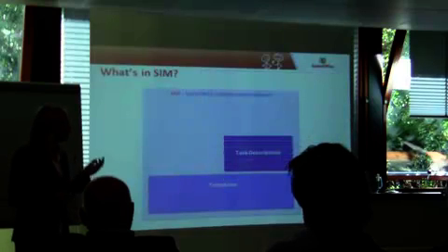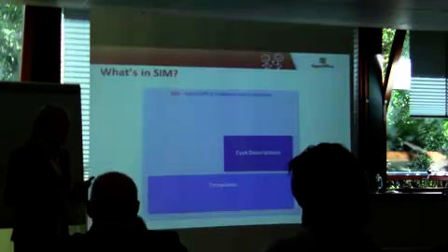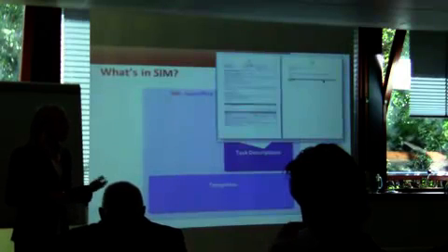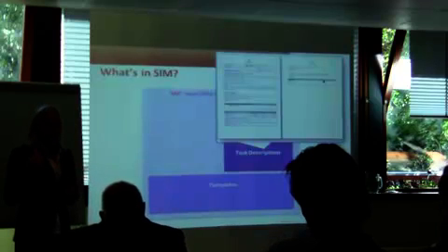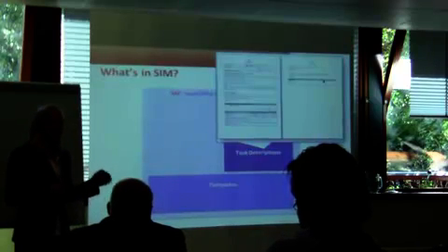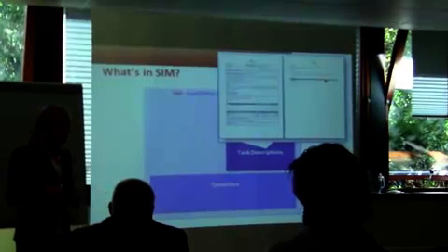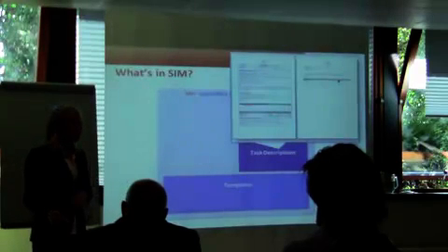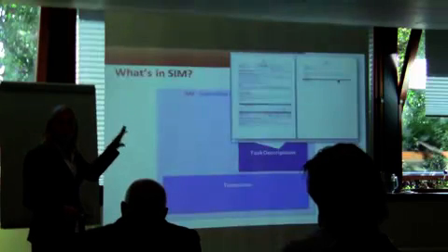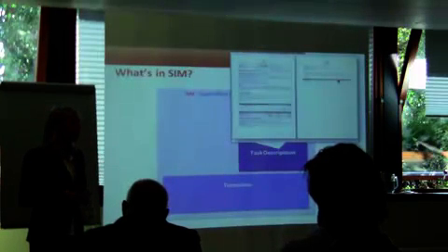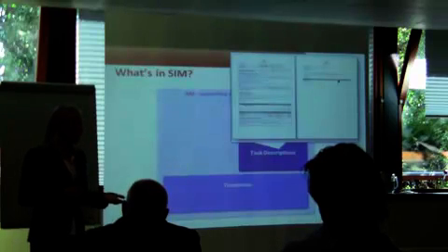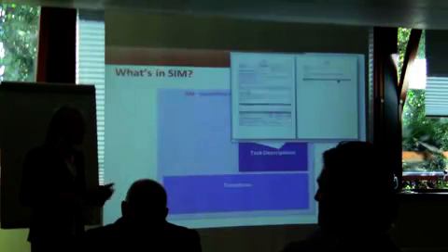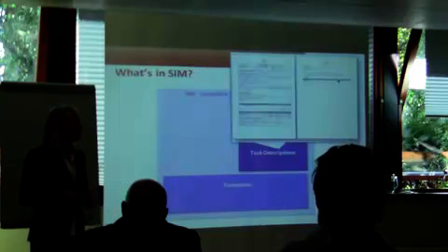But before being able to put the result into a template, we also have some other elements. We have what we call the task description, which is sort of an order confirmation that we send to the customer when they have ordered a service from us. This order confirmation contains a description to the customer of what the customer needs to prepare in advance before our technical consultant or business consultant comes to the customer to perform what he or she should perform. What the consultant will do will also be stated in this document. This is an agreement that the customer will receive beforehand and be able to discuss or ask questions about. If we don't hear anything, we think that everything is fine, and we'll come and install, for example.